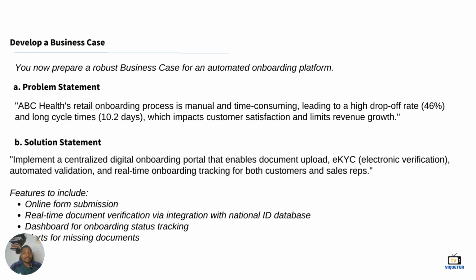I want us to implement a centralized digital onboarding portal that enables document upload, electronic verification, automated validation, and real-time onboarding tracking for both customers and sales reps. You've taken the problem, dissected it, and you're able to come up with a solution that meets that problem. And you include it in your business case document. And you could go ahead to even define some of the features that your solution would have.